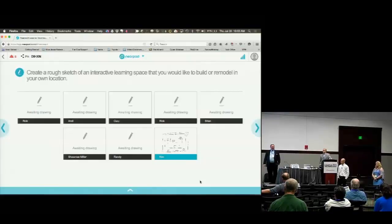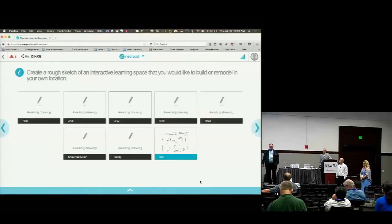Once again, I would not recommend that. If you could take a year and a half to put together a building this size, I think you'd be better served. Some of the lessons learned, the reasons we did them was just the time frame. Some of those things we thought might be things we didn't want to do, but the time frame made everybody obviously antsy. We have a difficult space where we just had to make this happen quickly.